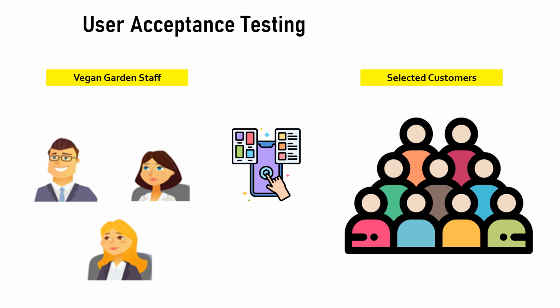The second set of audience for testing were the selected customers who visited the restaurant regularly. Jane requested for their help on reviewing the application and requested feedback. These customers checked whether the app was easy for navigation and ordering and if there were any issues during the booking process. The defects identified during the testing process were fixed by the Scrum team. New features and feedbacks were added to product backlog as a user story by Alex and Phil for prioritization later on.